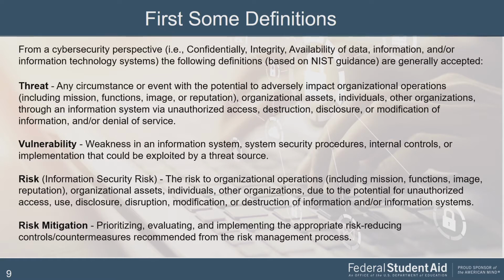And risk is basically the product, or function, of the probability and the impact of an event being realized. Once an event is realized, it's no longer a risk, it's an issue or an event that has to be treated and addressed and managed, such as a cyber breach.